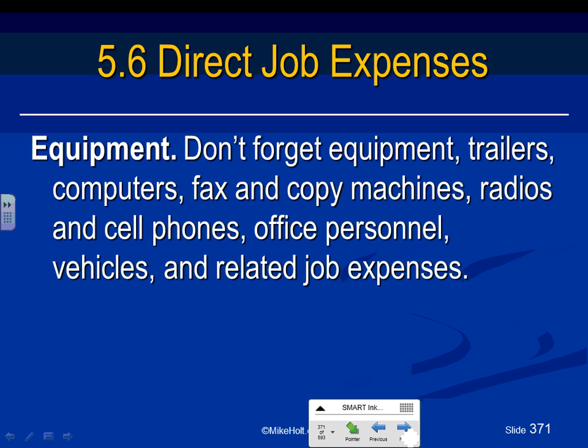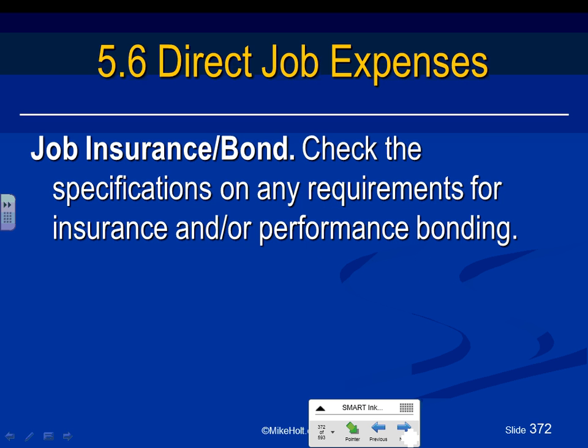10% above my value, and that will cover everything. You see what I mean, guys? Based on your history. A lot of people know their business really well, so they can adjust this one without getting into the detail that we're showing. The detail is for you to not forget things.